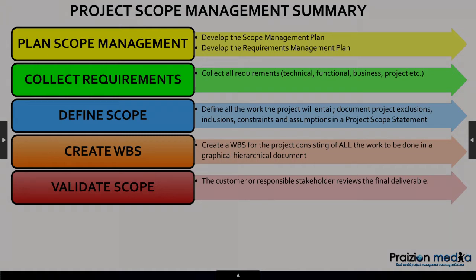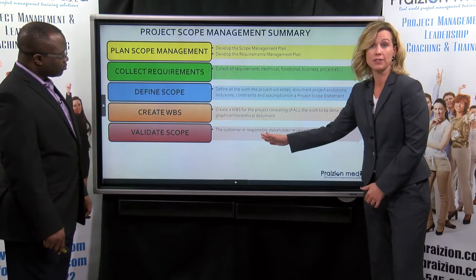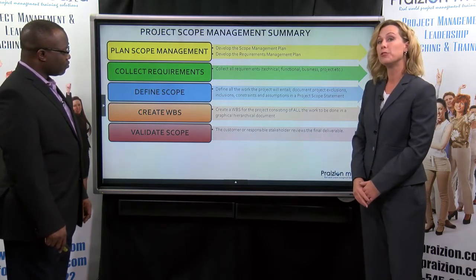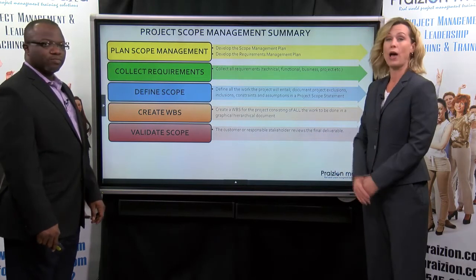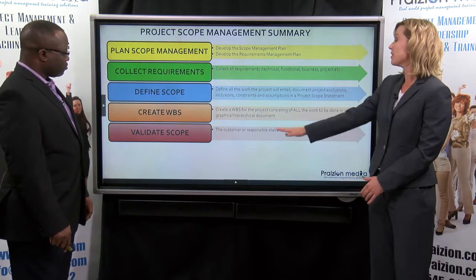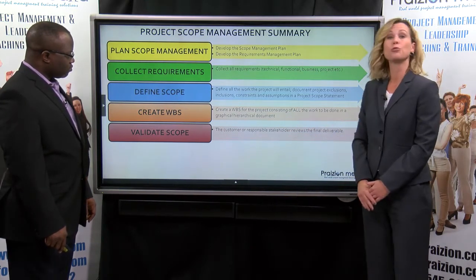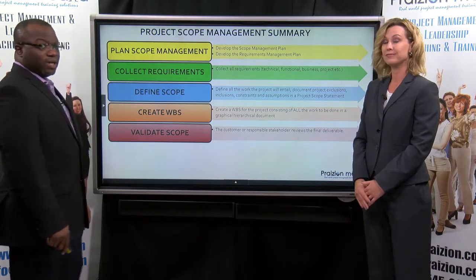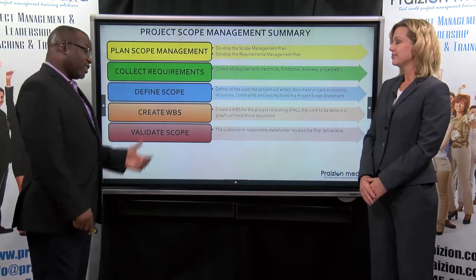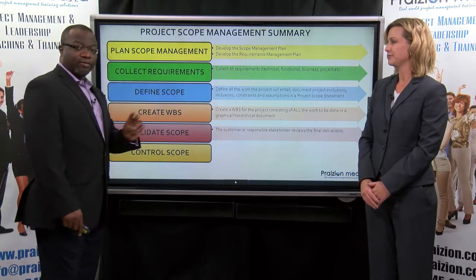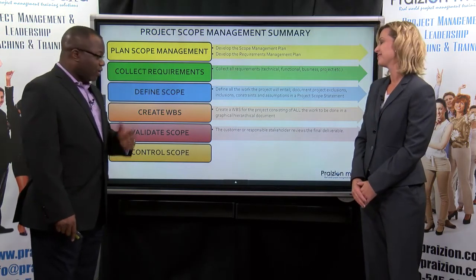It's where we look at our deliverable with the stakeholder, specifically the customer, who may come to these meetings, and this is where the deliverable is reviewed and change requests may come about. Ultimately, this is the last process we do before we move into the closing process group. And again, like Emily said, it really is the last, which means it does come after this. Theoretically speaking, and in the real world too, we should think like that.